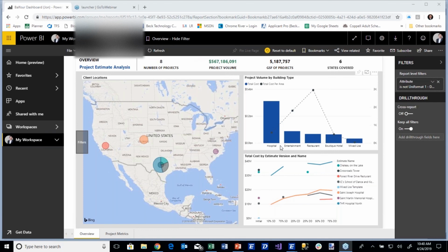So what you could do with that is maybe drive quantities of a specific, let's say like carpet, for example. Let's say you have 4 or 5 different types of carpets or different grades of carpets. Some of that information might be in your quantity takeoff, like the grade or the quantity. But you might also have additional data that's in your project metadata around location. And that location, depending on the building or conditions on the site, may also have an impact on the pricing for that carpet. And so you can actually pull information from both 2D and project metadata together to help quantify or price any of your estimates.